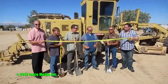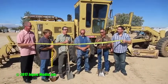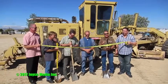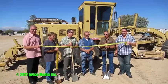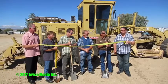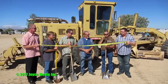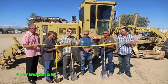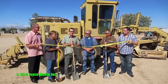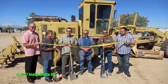Okay, so we haven't exactly got a permit yet, but moments away. We're probably another couple weeks maybe, or a week for a permit. Yeah, plans will go back in today, so probably about a week or so. He's going to be ahead of schedule and everything else, so we'll make up for lost time. We'll do whatever we can to expedite it.